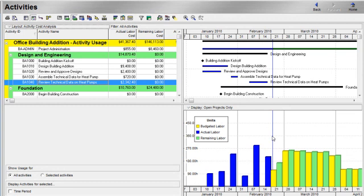In the profile, you can select to display labor, non-labor, material, and expense costs, or you can display labor and non-labor units allocated to the activities in your project over time.